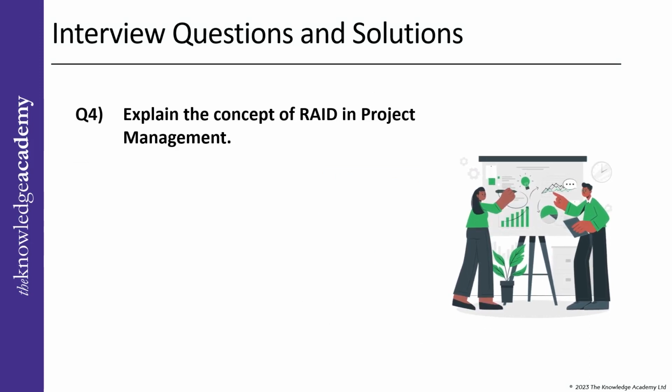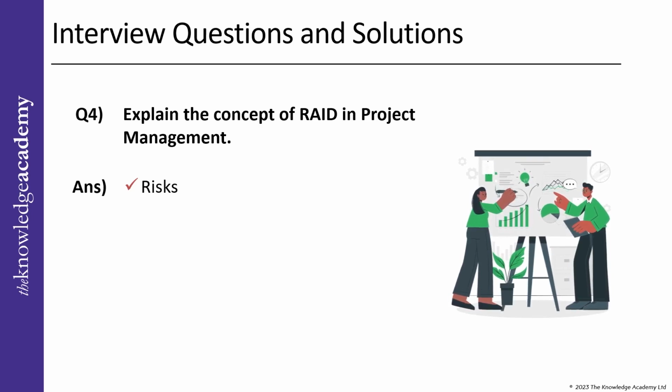Answer. RAID is a very important tool in project management. RAID stands for risks, actions, issues, and decisions. It is used to track all these things. You can also explain each of them in detail, like risks. Any event that could be detrimental to the project throughout its course can be considered a risk.